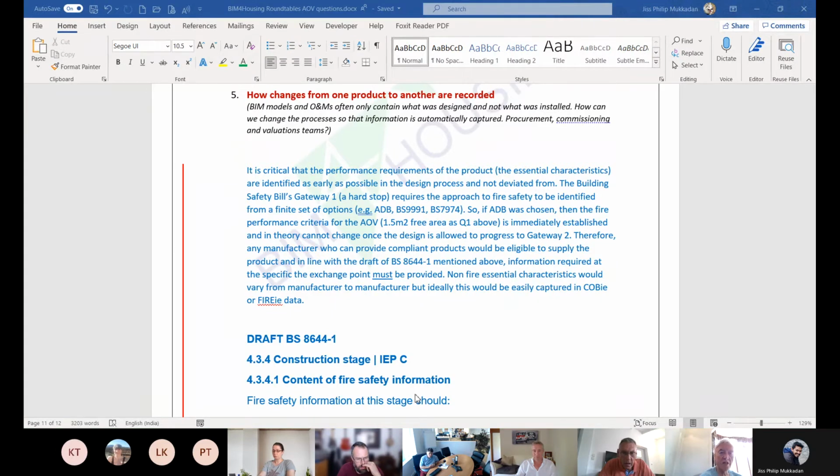Now, in construction, at least there's a methodology by which that's done through the change management and the technical submittal process. But the important thing about the technical submittal process that we need to make more rigorous is that the designer needs at least to start by saying what product it is that they were going to use.